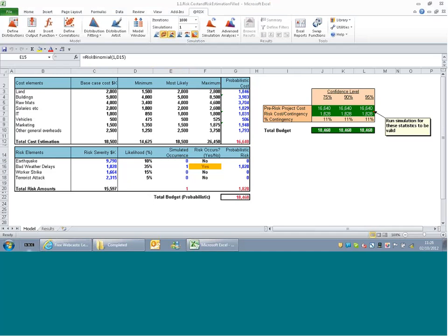We have actually done some custom development where we've automated the process for customers. But there is a workaround, which is that for any Primavera schedule you've got the option to export that to Microsoft Project, and of course once it's in Project then you could use at-risk 6, which is a little bit more cumbersome, but it is a workaround which some people can use.